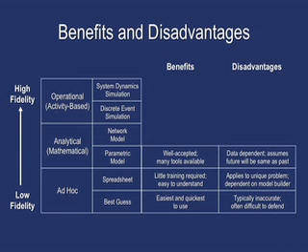For a parametric model, benefits are that it's well accepted and there are a lot of tools available. You see a lot of statistical analyses being conducted in all sorts of industries, so very, very common and lots of tools available. Disadvantage is that it's very dependent on data, so you need clean data to make sure that these projections are good. And it also assumes that the future will be the same as the past. If data were collected in the past, and that's what we're making these estimates, these trends based on, then the conditions that existed when these data were collected need to be the same as in the future. And so implicitly in the statistical approach, there's an assumption that the future will be the same as the past, which often is not the case at all.